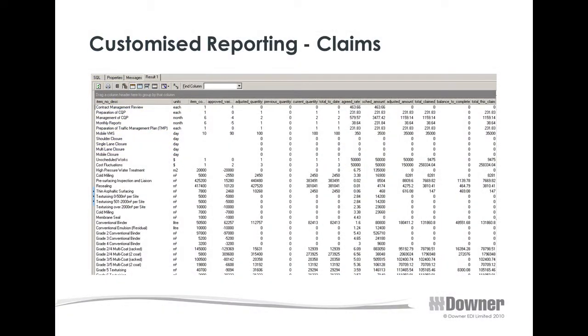The other report, and this is probably my favourite, is a progress report of outstanding work versus completed work. So every month everybody knows how much work's been done and how much is still outstanding, and we've got the budgets running through as well. We know very well when we're out on site sometimes things change and we're asked to increase the size or make another change to the existing requirements, and this allows us to monitor where those changes have occurred.